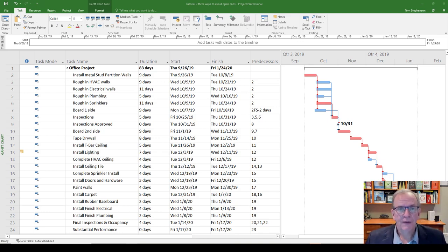If we have a lot of headings in a work breakdown structure, the headings shouldn't be linked either. But other than that, every activity that needs to be completed needs to be linked to something, because otherwise you're saying it doesn't matter. If it doesn't matter, it could take as long as it needs to, and it's not going to impact other stuff, as you'll see in a minute.